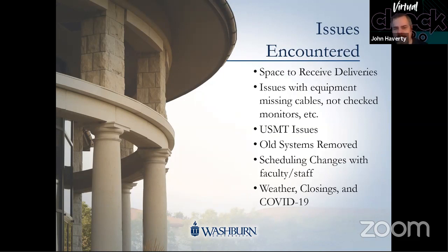So some of those things that came up, just things that we made a mental check that when we go through this process again, we will get all equipment in to test everything and make sure everything hooks up, and not just assume that a monitor is going to work the way we expect it to work, but actually get everything in, test it, and make sure things are working, which is normally what we would have done previous years, but this was a little bit different. We were gearing up and a lot of systems that we were testing and going through that process.